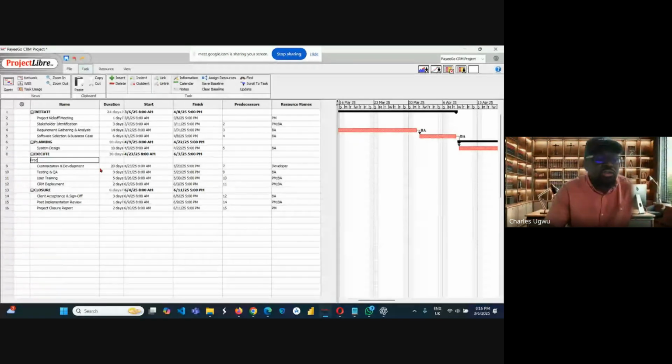If you are working on a construction site, procurement starts when you start building the house, not when the engineer is designing the pattern of the house. You don't start buying trips of sand and cement then. After the design, you clear the site and lay the foundation. So it starts from execution.